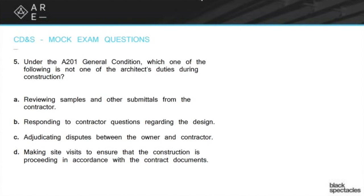However, it is very important not to take control of the timeline. You absolutely do not want to be telling anyone to stop work or directing the sequence of construction. Once you start saying things like 'stop doing that and start doing this,' you've taken control of the schedule. If the building isn't done on time, the contractor will point to you and say you took control — so be very careful about talking about the schedule.